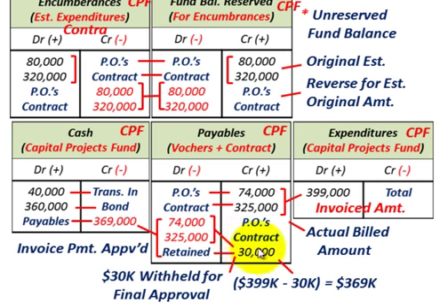So just remember, any holdbacks on contracts for final approval: you could have just taken the net amount between those contracts, the $325,000 less any holdbacks, but just to show what's going on and understand it, you reduce your payables by the total actual amount billed, and then you would credit back any amount that's being retained.